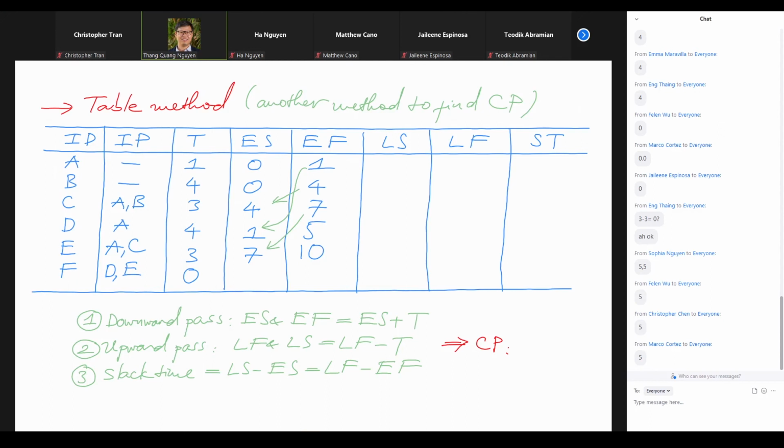And next, we need to do the F. Then one more time, because we don't have the arrows in front of it, we would need to ask the question, what comes before F? So D and E come before F. It means we have to finish D and E before we start F. D is finished at 5. E is finished at 10.